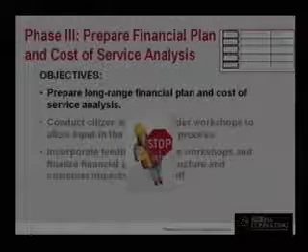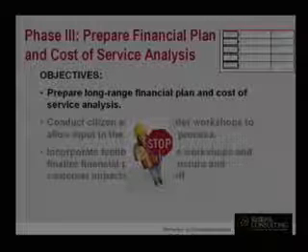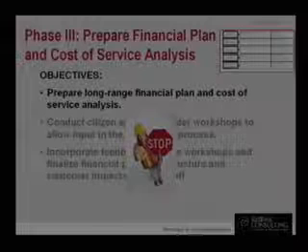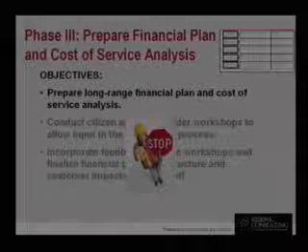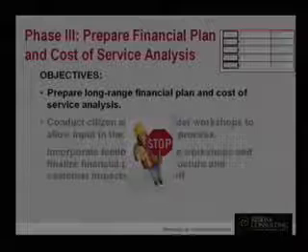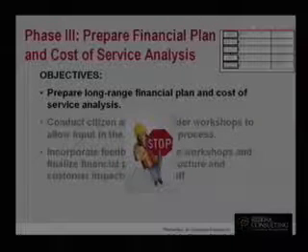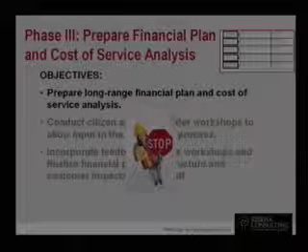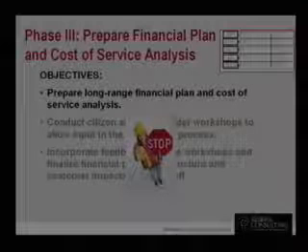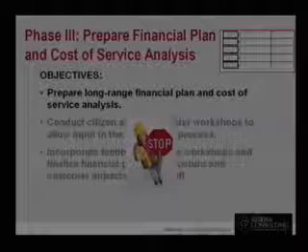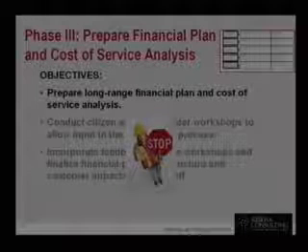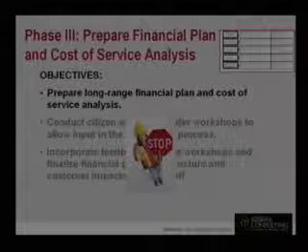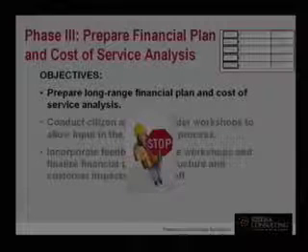Thank you, Dennis. We have built into this project a purposeful stop, and that is a stop after we complete phases 1 and 2. And in phase 3, we prepare an initial long-range financial plan. This initial plan would look at existing revenue sources that we have without any increase or change, and compare those revenue sources to the cost that Dennis referred to that results from phases 1 and 2, the conversion of the assessment of the department's operations into best practices and into metrics such as cost per 1,000 gallons. And then comparing the two, we take this time out.